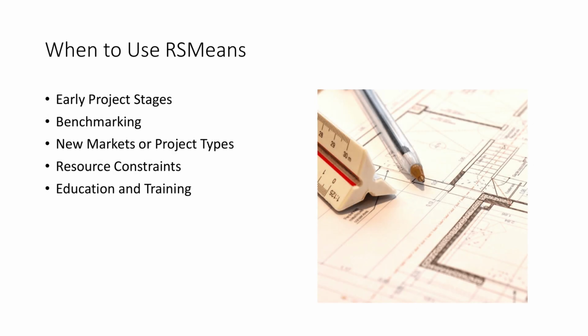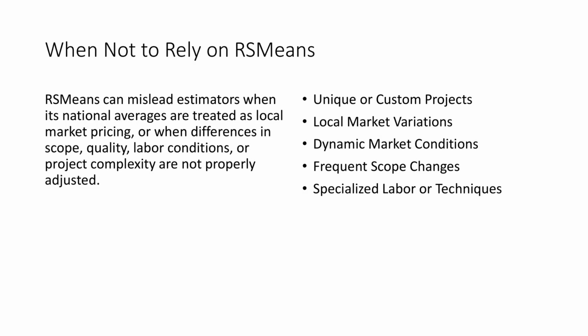RSMeans is most valuable early in the project lifecycle, when benchmarking options, when entering a new market or building type, when time or resources are limited, and in education, like this class. RSMeans can cause problems when its national averages no longer reflect the realities of the project.